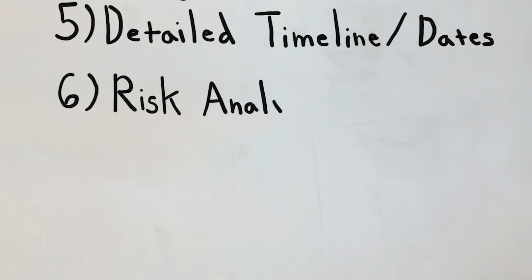We're starting to conduct some risk analysis. So as we drive the detail into that project, it's going to allow us to see, okay, we've got a lot going on in week 2 and going into week 3. So we know there's inherently more risk involved there. And so we might see how we mitigate that by maybe having a backup resource, something like that where we can help mitigate some of that risk.